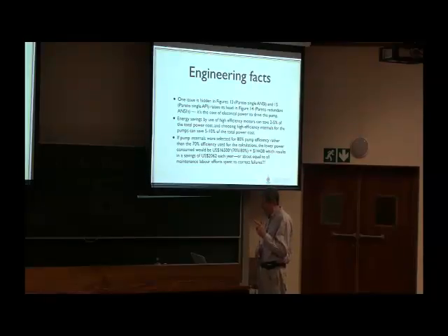Energy savings by the use of high efficiency motors can save 2 to 5% of the total power cost, and choosing high efficiency internals for the pumps can save 5 to 10% of the total power cost. If pump internals were selected for 80% pump efficiency rather than the 70% efficiency used for the calculations, the lower power consumed would be $14,000, which results in a savings of $2,000 each year, or about equal to all maintenance labor efforts spent to collect failures. So you get that as an extra benefit during the analysis process.